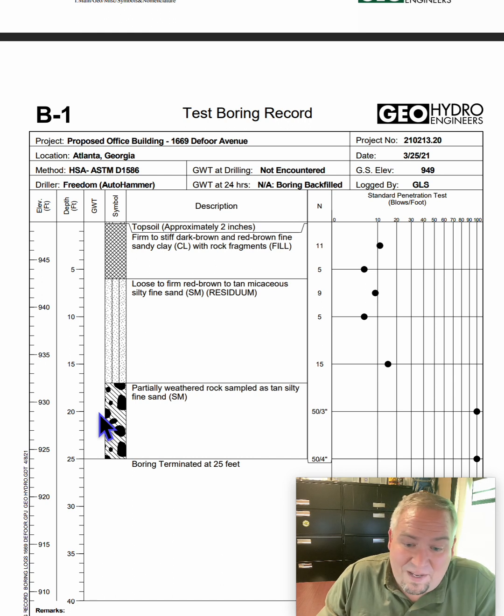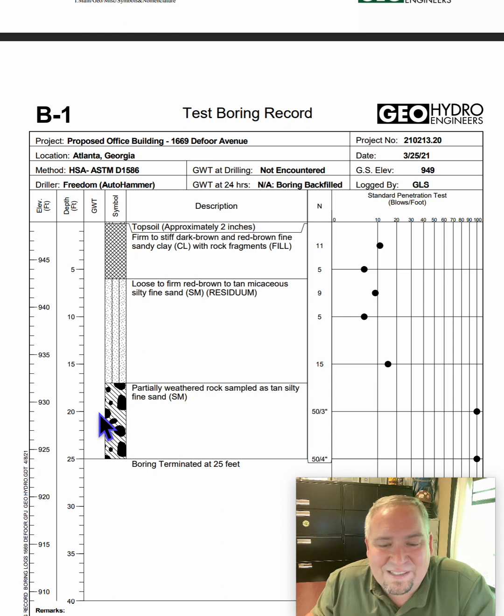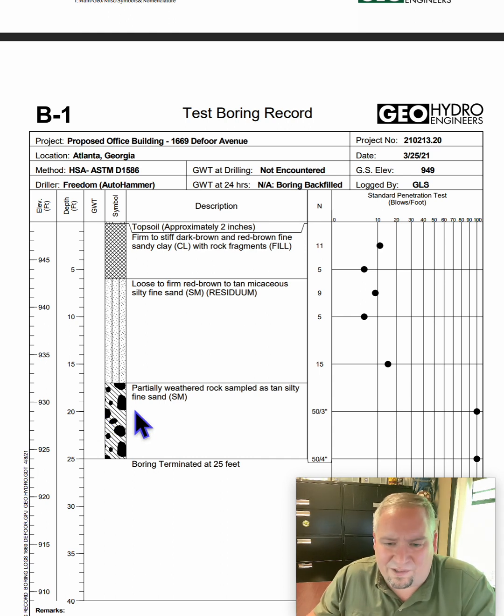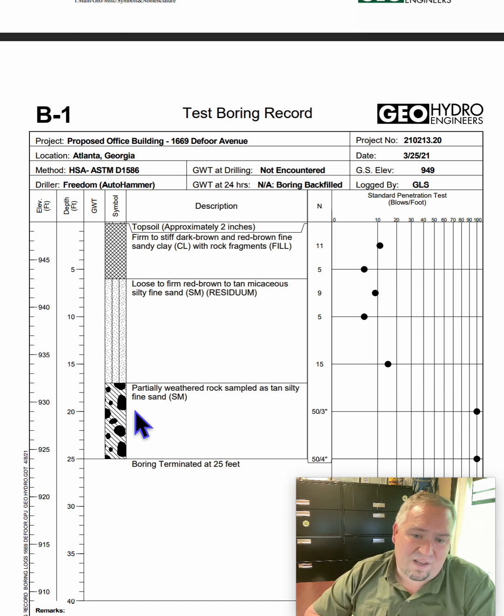And then have a plan B, so when we got our crew standing around, they could be working on something else. Or have a geotech ready to have answers, or have the superintendent ready with a time and material sheet ready to go. All this stuff can be agreed upon.